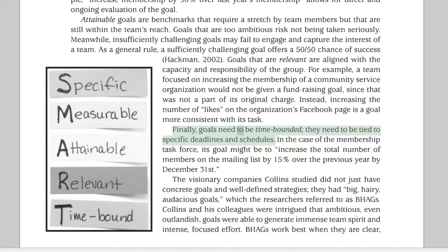Finally, goals need to be time-bounded. They need to be tied to specific deadlines and schedules. In the case of the membership task force, its goal might be to increase the total number of members on the mailing list by 15% over the previous year by December 31st.